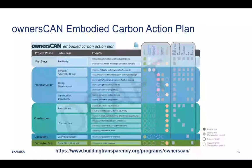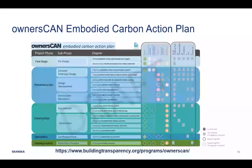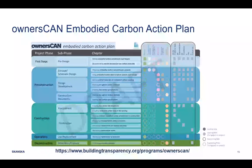Part of the Owners CAN network is that those companies have come together and put together an initial framework around what project teams can and should be doing at each project phase to address embodied carbon. The framework shows a matrix of all the different stakeholders — construction manager/general contractor, consultant, architect, structural engineer, and others — and what each stakeholder's responsibility should be at different points in the pre-construction and construction process. This information is available online: just Google 'Owners CAN embodied carbon action plan.'